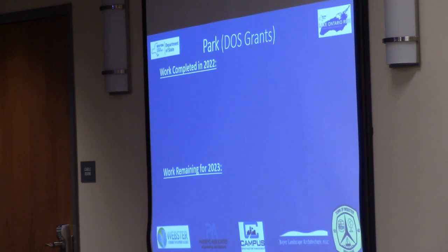The next area of work is the park. That's the one that changed probably the most. Work completed in 22 is the fill operation, bringing in a ton of fill in that area, really raised the whole profile of that area up. Installation of the stone walls, which you'll see in some of the photos. That's around the playground area and the woodland trail.